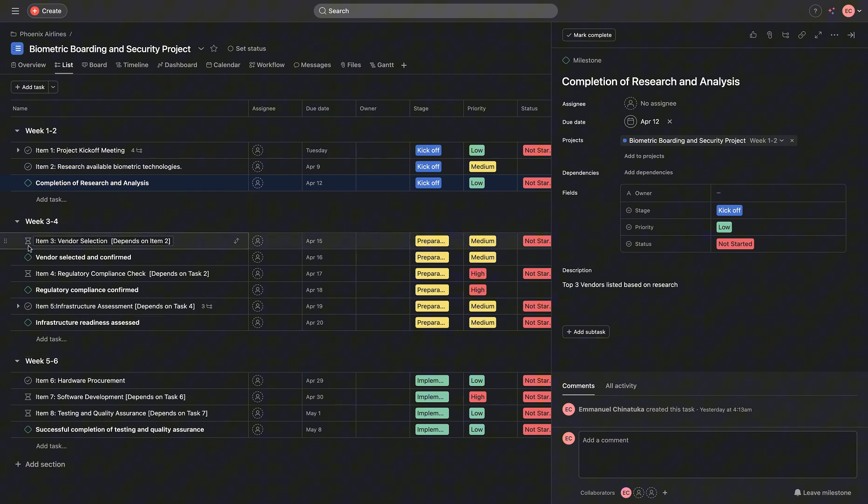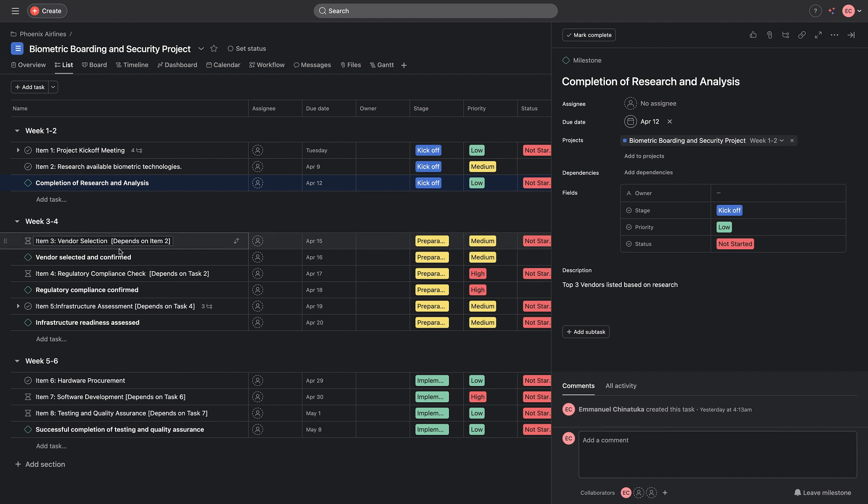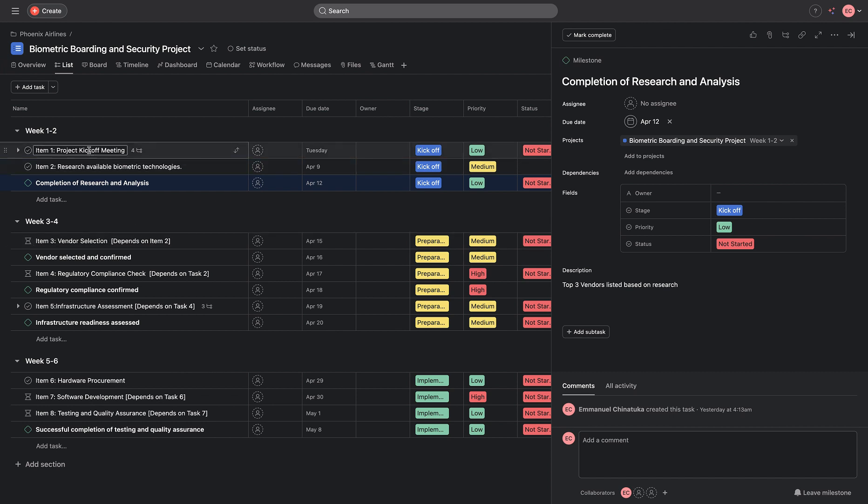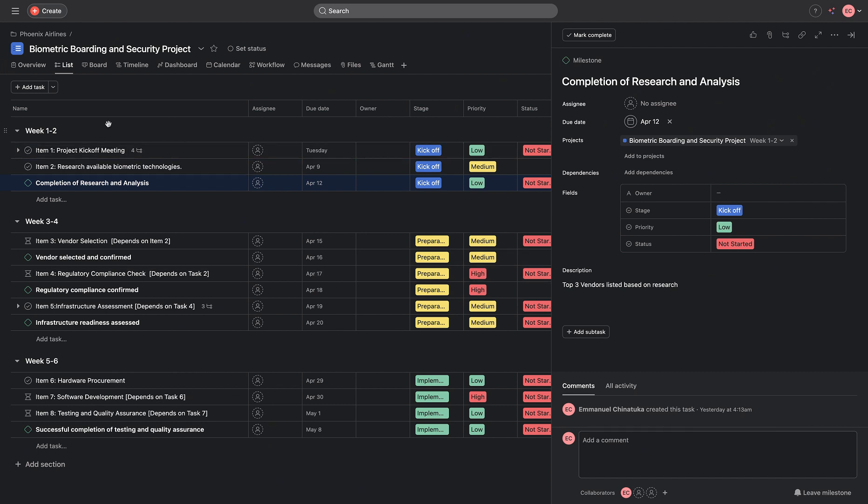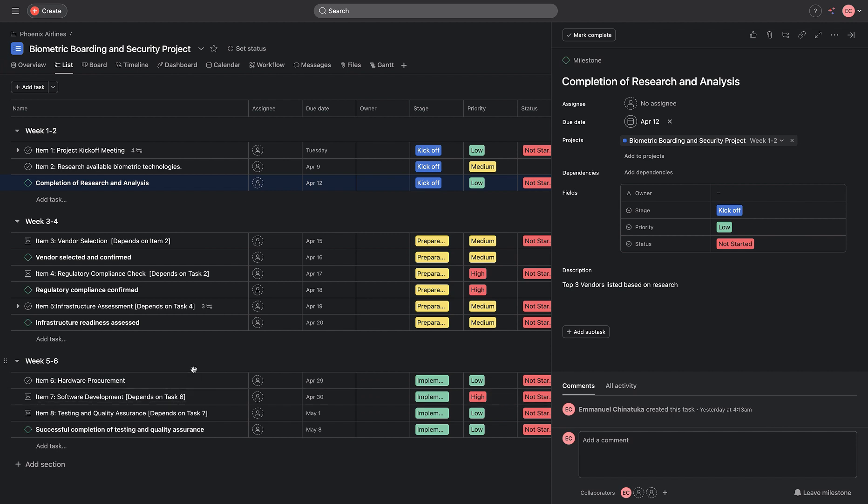And if you can see the one that has the time icon on it, this particular work task means that item 3 depends on item 2, and item 4 depends also on item 2. Item 8 depends on item 7. So, this is very important for you to take note.